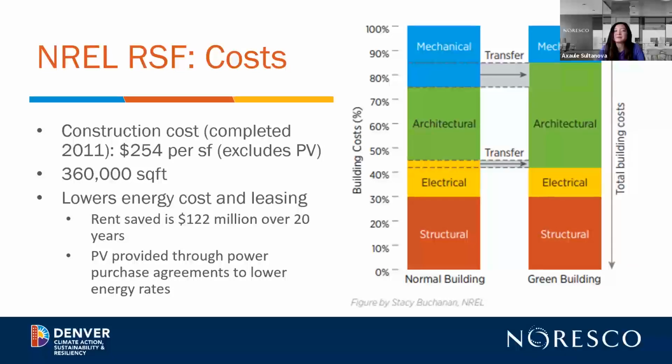One word of caution for processes like this is to make sure that the mechanical, electrical, plumbing, and other consultants in the project are encouraged to pursue passive opportunities, that they are encouraged to pursue systems that are cheaper. In order to do that, we do not want to tie their compensation to the cost of the MEP system. So maybe looking at it more creatively, we want to inversely add an element of inverse reward to the MEP system cost, or look at more alternative options to compensate our consultants.